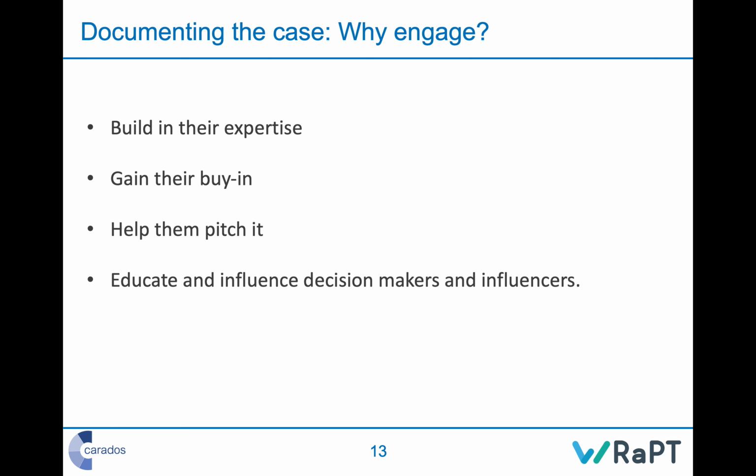Thirdly, you may need to help them pitch it. You might be talking to people in the investment process who are the ones that need to talk to other people about how this is important. You're not going to get to speak to those most important people. The problem you've got, if you hand a business case to someone and walk away, is you've got no influence over it. You don't know how they're going to present it. You don't know whether they're going to say the right things, the wrong things, whether they're going to be bothered, whether they even present it or not. So by talking to them, you might get a chance either to coach them as to how to pitch it or to help them pitch it themselves and actually see these people.